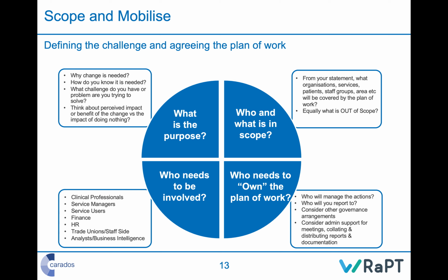First thing is you need to make sure that what we produce meets what we need. So if the problem is we haven't got enough nurses, it's too expensive, we are not providing access to patients, they're all very different. Because if it's we haven't got enough money, well, we know that our solution's got to be cost neutral, better than cost neutral. It's got to save a certain amount. If the problem is a small one, we know it's a fairly small project to deal with. If the project's a big one, we're 1,000 nurses short, or 1,000 GPs short, or 1,000 care workers short, well, it's going to have to be a much bigger project.